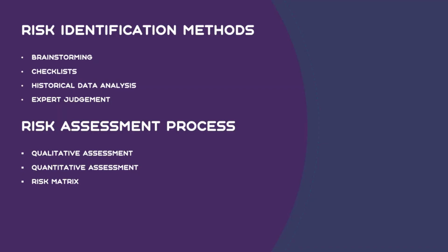So the first criterion is the likelihood of occurrence. For the budget overrun, what is the likelihood of occurrence? When you prepare a CTC, if the cost is really high, the likelihood of occurrence you will put out of 10, maybe 9 or 8. You will put 10 also, because if you leave this risk unaddressed, your contract is going to collapse. You will end up with more money than the budget. So out of 10, I will put 10. The likelihood of occurrence is 10 for me, because it's a very big risk. It has occurred already.